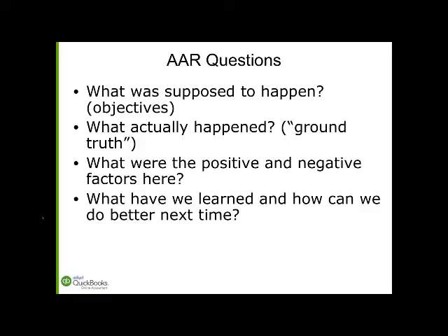The Army doesn't want you to spend more than 50 minutes on an after-action review, up to an hour, I think, is their guideline. And it's a post-mortem. It's an autopsy without blame. It's not a blame game. It's not pointing your finger at people and saying, oh boy, Baker, you really screwed that up. It's a learning tool. It's to learn how to do it better next time. The Army has a great saying. I love this saying. The Army never wants to build the same bridge twice.